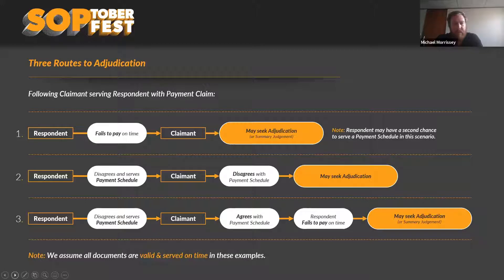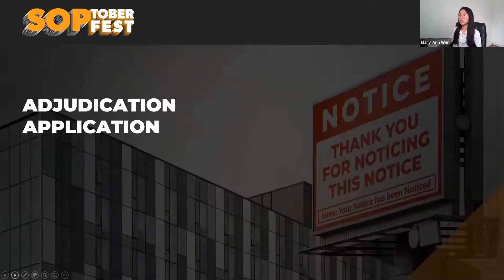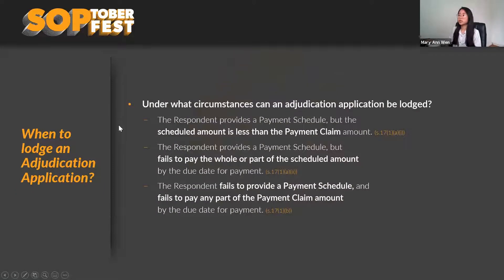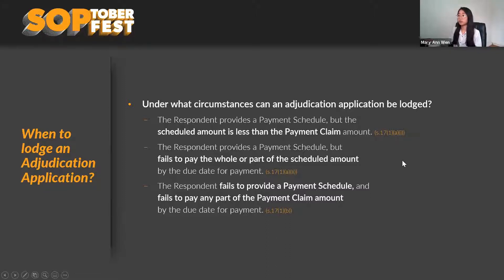Now touching on the adjudication application: when do you lodge one? Under section 17 of the Act there are three scenarios. The first is where a payment schedule has been provided but the schedule amount is less than the payment claim amount. There's no threshold on how much less it needs to be — theoretically even a dollar less than the claimed amount means you can adjudicate.